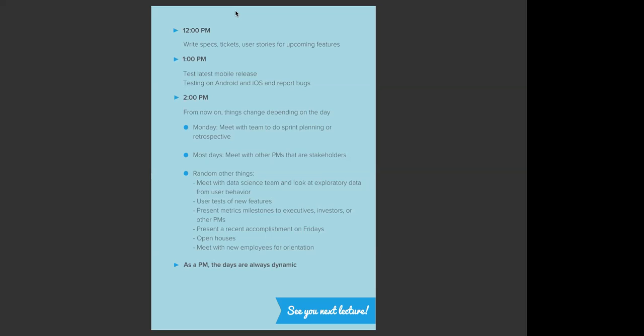So that has to be addressed before you even continue. And then you know how many stories your development team can take at any given time. Over the past year, they've always been able to take about 40 stories per sprint cycle. So you don't give them 60, because that will impact their velocity.